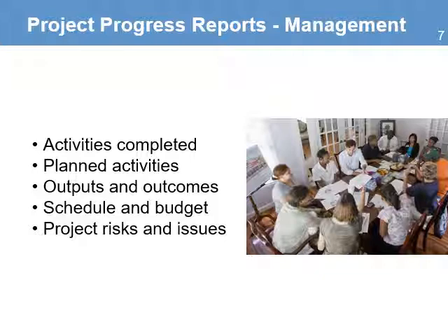Your report will present the following information: all the activities completed in the previous period, the planned activities for the next period, progress made on key outputs and outcomes, information on the schedule, milestones, and how you're managing delays, information on budget and the analysis and balances, and the status of the project risks and issues, and the actions you are taking to manage them.